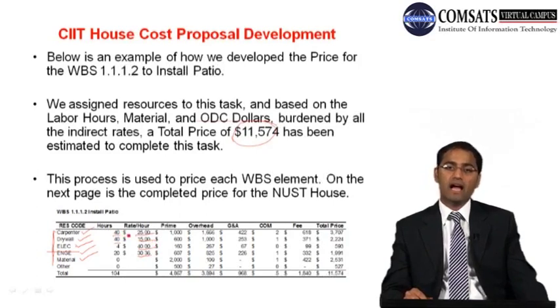So through that we have hours and rate per hour. So we will have the prime cost. Now prime cost is rate multiplied by the effort: hours and rate per hour will give you the dollar amount.